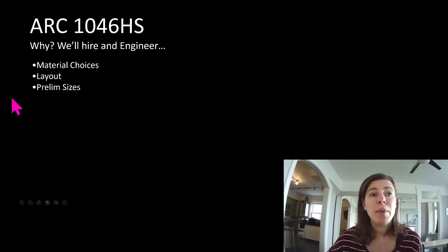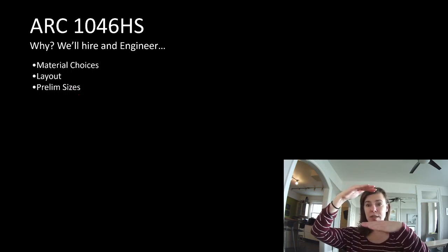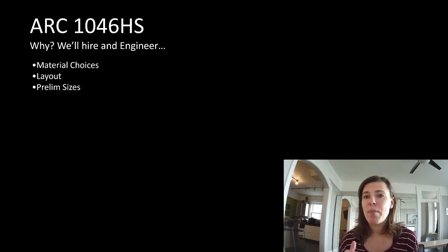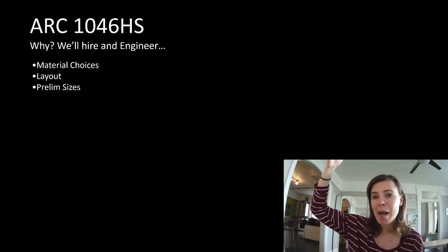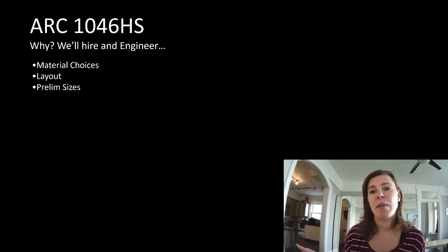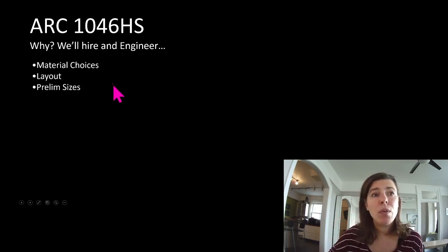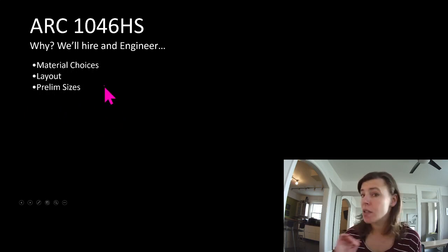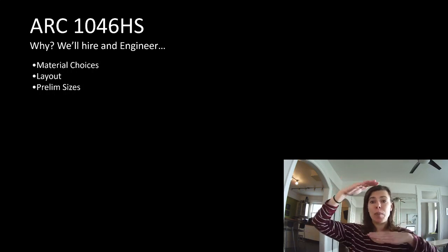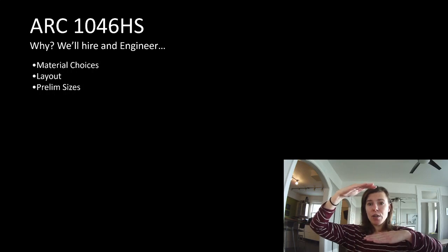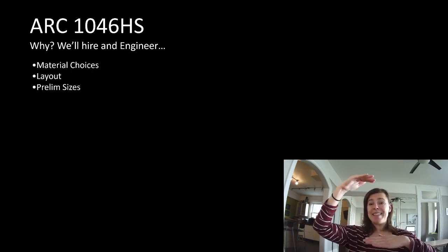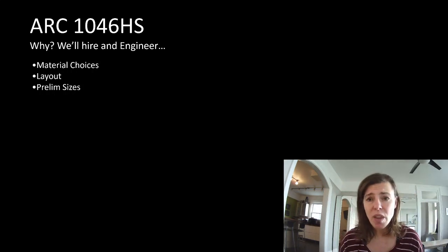And if you find out those preliminary sizes are way off, you would assume you need this floor assembly because your steel was this big. Well, your floor assembly actually needs to be this big because your steel's this big. That's going to change headroom in a building. You need to increase your story to story height. And if there's a cap on the height of the building, you lose a whole floor of your building. So the consequences can be dire, and you're making them long before you have an engineer. So you need to know, why do I pick what material? How far can each of those materials span? And once I make that choice, what size do those things need to be? Roughly, it's not the final answer, but you want to be pretty darn close. And you want to make sure, if you're not sure if it needs to be here or here, you want to draw here so that if it's this, it fits. But if it turns out to only be this, oh, you've got some extra room. It would suck to find out it needed to be this and it doesn't fit in your floor, into your floor space, into your top to soffit.